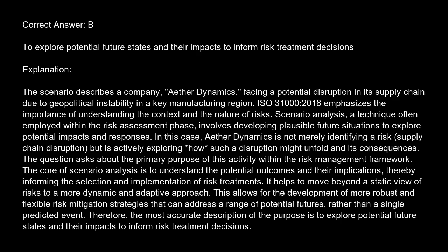Explanation. The scenario describes a company, Ether Dynamics, facing a potential disruption in its supply chain due to geopolitical instability in a key manufacturing region. ISO 31000-2018 emphasizes the importance of understanding the context and the nature of risks. Scenario analysis, a technique often employed within the risk assessment phase, involves developing plausible future situations to explore potential impacts and responses. In this case, Ether Dynamics is not merely identifying a risk, supply chain disruption, but is actively exploring how such a disruption might unfold and its consequences.